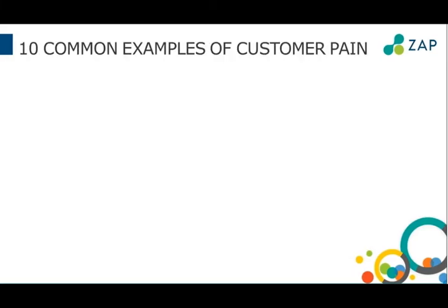Look, the final slide here today, so that I can wrap up and get a couple of questions hopefully, and we can talk about some things of interest, is the sort of customer pain that we see. Firstly, as I've said, and I'm just reiterating it, don't tackle it too late in the deployment of your ERP or CRM solution. We've got lots of customers that have made massive customizations to the ERP, which is fine, it's fantastic. But then they've got to the point where that's done and it's in process and they're deployed and ERP is working, and they realize they don't have their reporting or BI under control, and they haven't actually thought through what they actually changed in respect to their ERP processes, and a lot of the processes won't give them the information they need to run the business.